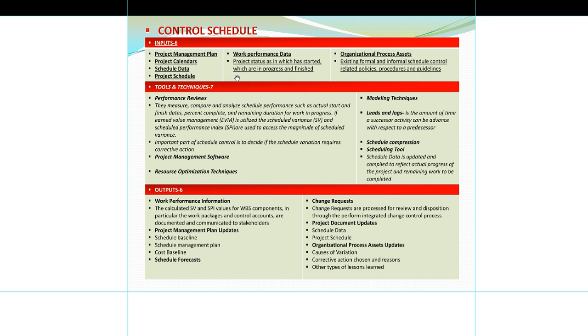Like I will have performance reviews, see how everyone is working. We had a baseline. Everything is working with respect to the time baseline. We plan to complete this in 6 weeks. How far are we right now? Are we going to finish it on time? Are we going to finish it early, or are we going to finish it late? That is done using earned value management. Again, these are formulas that you would use to calculate the time and the performance and where you fall right now.